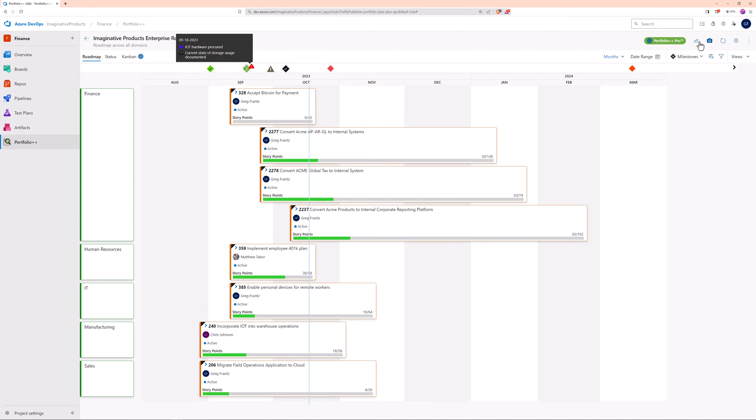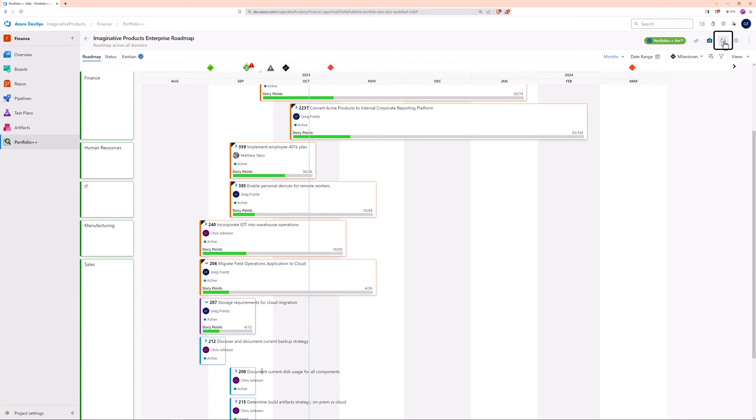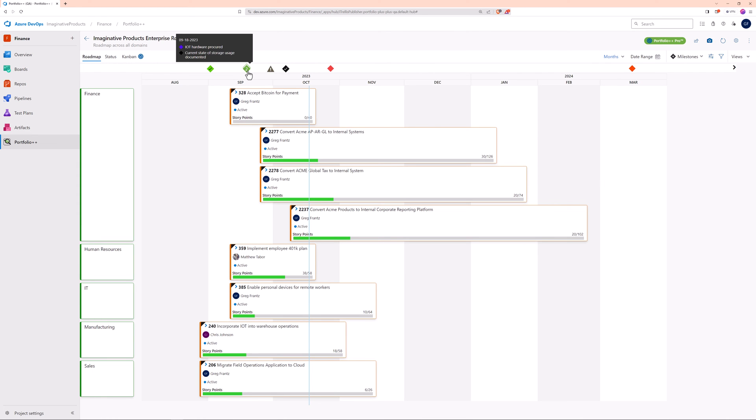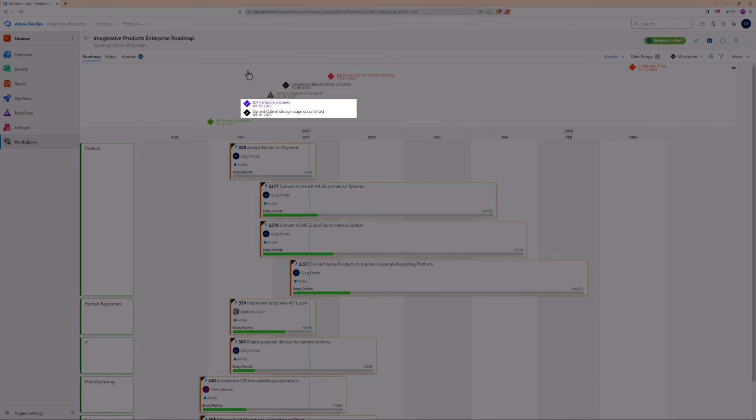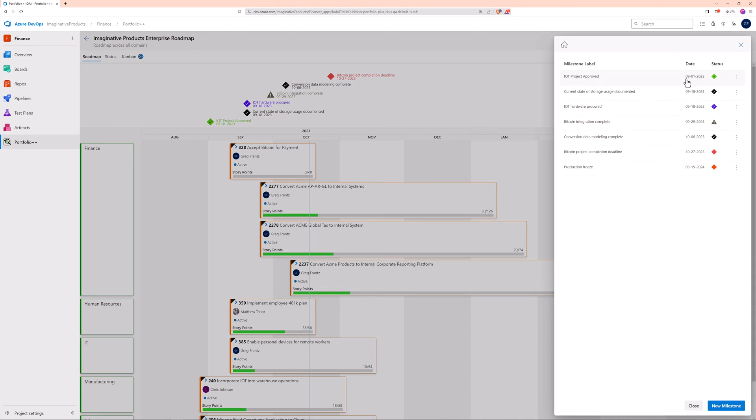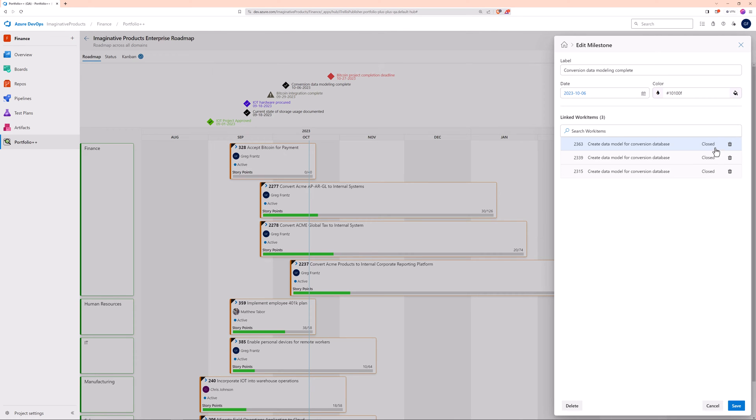Behind the scenes, we have since closed this work item. Now if we refresh the roadmap, we will see the exclamation mark replaced with a checkmark. For milestones that are linked to more than one work item, when all the linked work items are completed, the milestone will earn its checkmark.